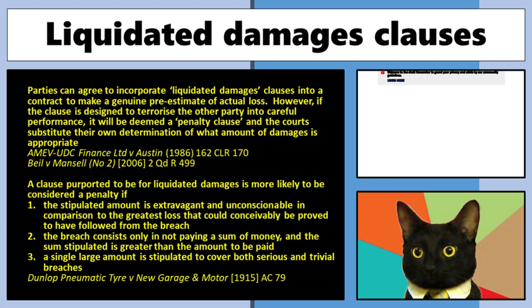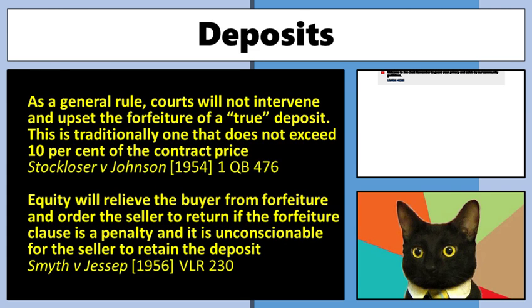Now, often you find with residential tenancies, residential property, it's often in the form of deposits, which, just as it happens, is actually the next slide, because it's not uncommon for deposits to be the thing which gets fought over, that amount. Now, what you can do in terms of commercial property, though, is for things like time. If this thing doesn't happen, or developments don't happen by a certain length of time, you're absolutely, completely able to put in clauses to say this amount is payable.